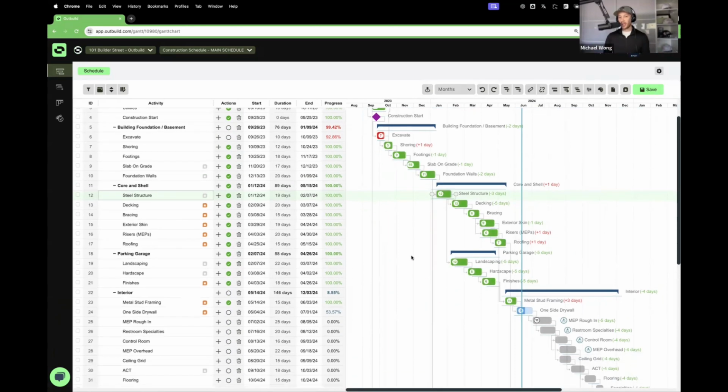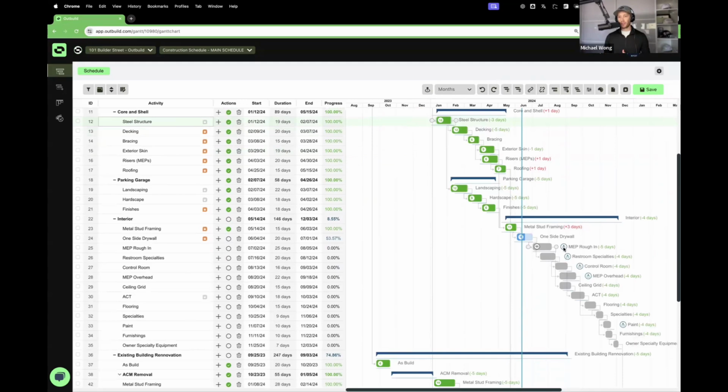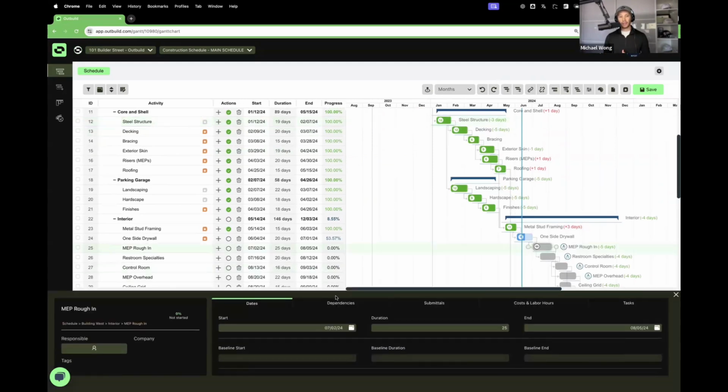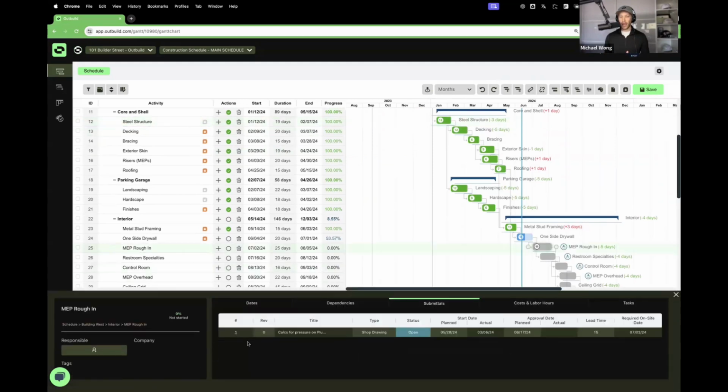From this point, you can also connect many different tools outside of the schedule tool specifically. Another big part of Last Planner is forecasting constraints, seeing what's going to stop the plan. We have tools that integrate with software such as Procore, where you can connect live submittal data to your actual construction activity in your phase plan. And that's a benefit because instead of having a huge section of your schedule dedicated to procurement or pre-construction work, you can connect this to your live PM tool, whether it's Procore or others.